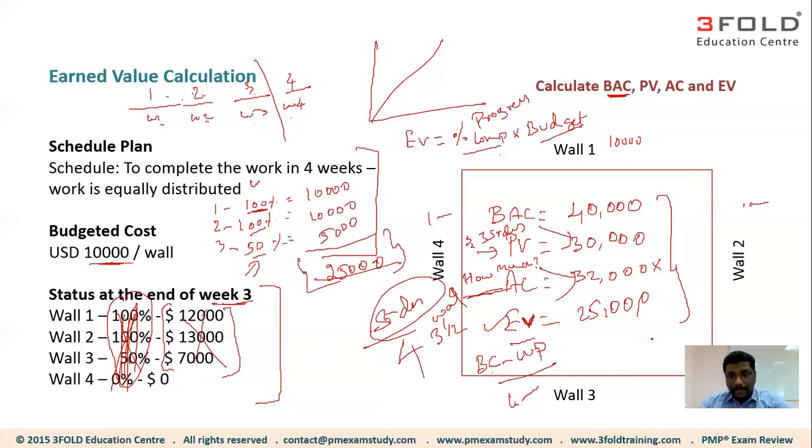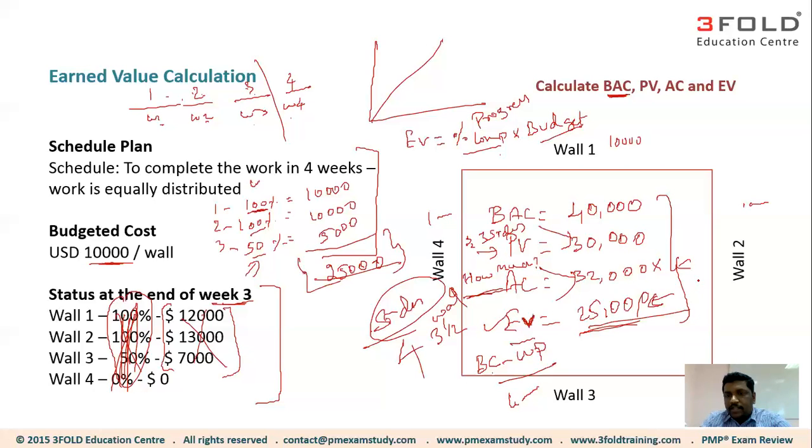Now we can make the comparison. All right. Because the value of the work you completed is 25,000, but you spent 32,000. So straight away, you spent 7,000 more than what you had accomplished. Number two, you completed $25,000 of work, but you're supposed to complete $30,000 of work, which means what? You are behind schedule. That we should know already, because at the end of week three,